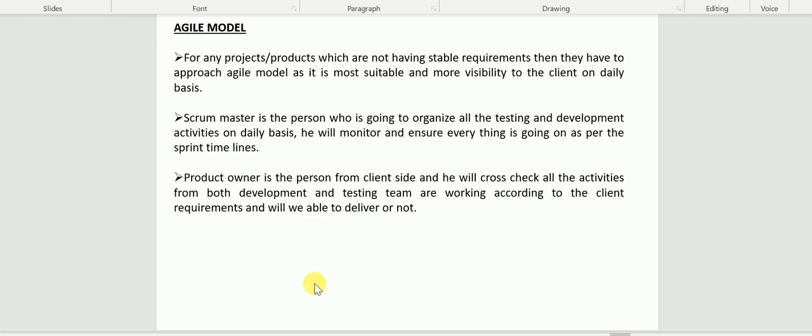Every day we have a call with the entire team and give updates, so we call it a scrum meeting in real time. Each team member needs to give updates: what they have done today, what they are going to do tomorrow, and what obstacles, meaning issues, they are facing today. These three things, every day. Mostly, as these are smaller teams, this call takes a maximum of 15 minutes to discuss that day's status, what they will work on the next day, and what obstacles or issues they are facing. So that is about the scrum master role.